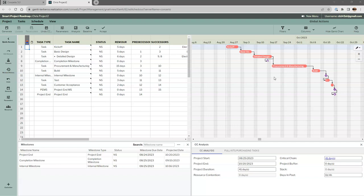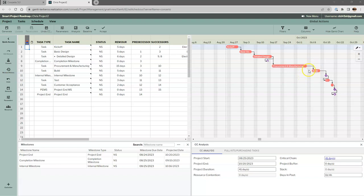Those are the two types of focusing milestones. Next I'd like to discuss preparation points — we call these full kit points. We typically place a full kit point ahead of a phase of execution that requires a lot of integration from outside entities. For example, if I have procurement activity or manufacturing — parts coming in from vendors — I need to receive them all before I go into assembly or build.